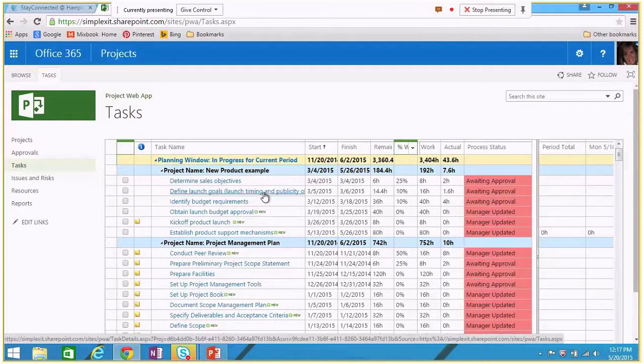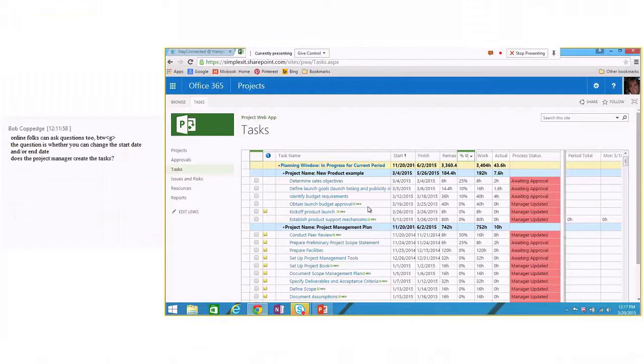So a good project manager will go to their team members and will go to the person doing this task and say, hey, we have to do this task. How long do you think it'll take? And somebody says, I don't know. And that's where a project manager says, well, give me the best case scenario and give me the worst case scenario. Give me an average. How long do you think it'll take?